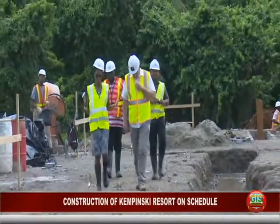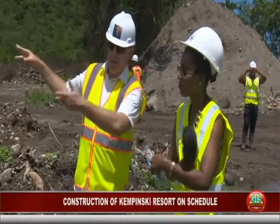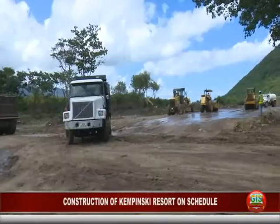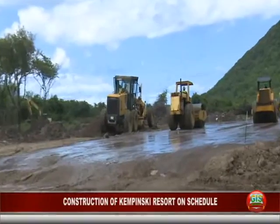On our visit to the site, we met and spoke with Gary Swarbrick, Senior Project Manager of Range Developments. He is one of about 6 from Range Developments overseeing the project. So, middle of July as we are now, we've got foundations about to be cast on the main building, far end of the site, and we're still in the clearing process over here in the swamp. It's going to continue to look like a large clearing for the next 12 months.